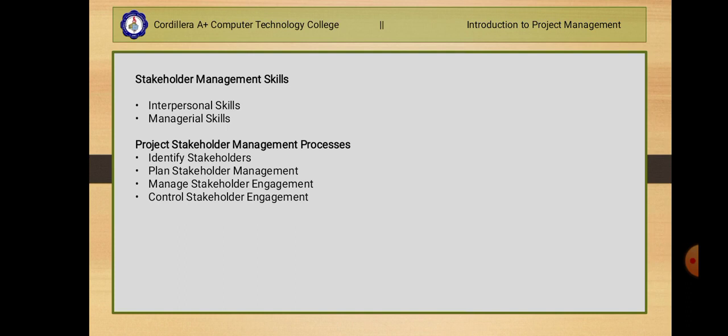So clearly, the process of stakeholder management always starts with the identification of the stakeholders in a project. Okay? So the first input is our project charter, if you are familiar with that one. The charter provides a high-level overview of our project or its customers, and it is a very useful document to help us start with the stakeholder identification.